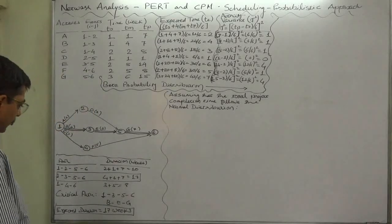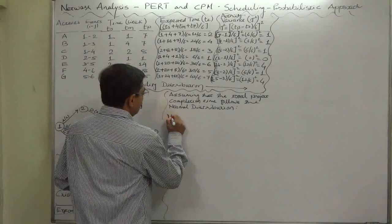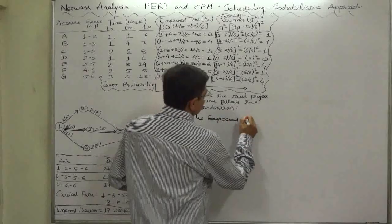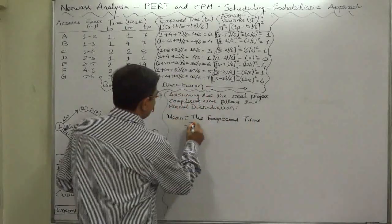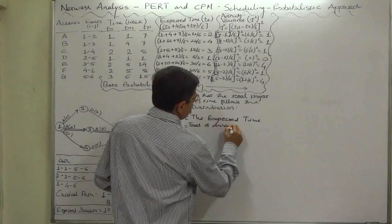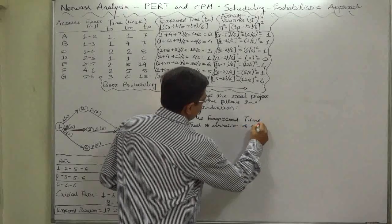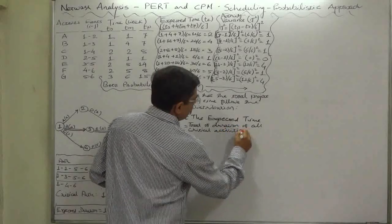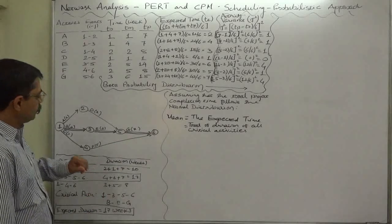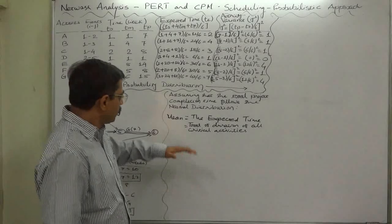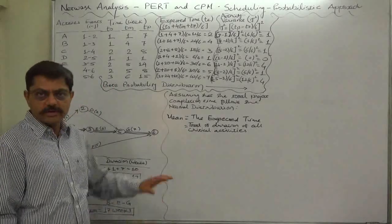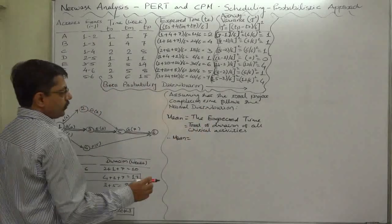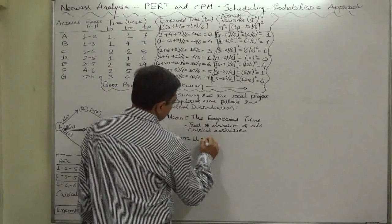What is the mean time? The mean time is this expected time. So here the mean will be the expected time — that is, the total duration of all critical activities. That is why we need to determine the critical path and recognize the critical activities. For normal distribution we use the symbol mu, and the mean comes to 17 weeks.